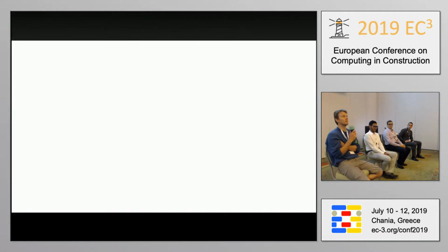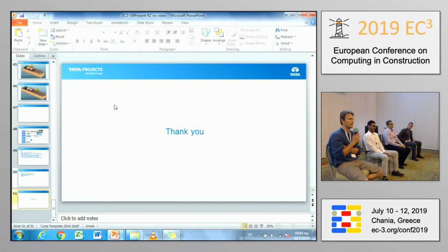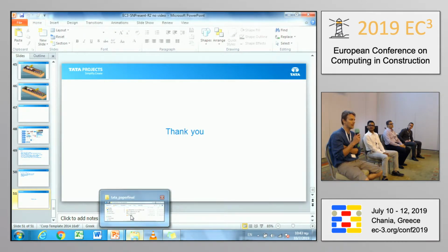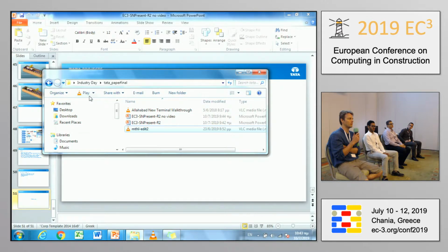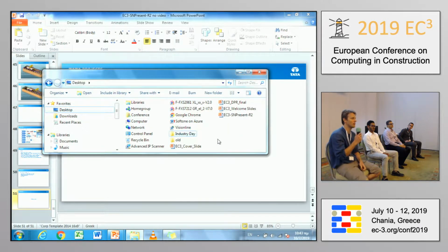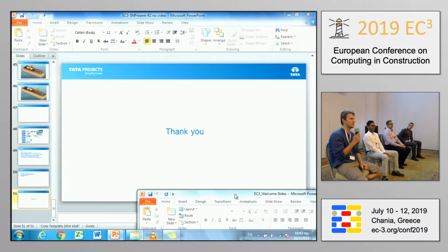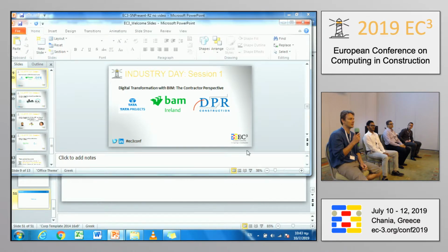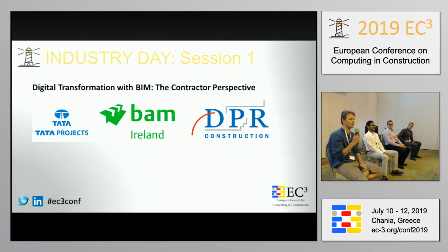Okay, so good practices have been that here at DPR we haven't done it so far yet, but what I've done before is really involve the subcontractors in training on using the tools and processes that are to be implemented on the project. This goes as far as training them directly on a specific tool, for example, exchanging BIM models. Really involve them in the training and try to have that mindset that we are together in a team, and not like you are the contractor, you have a contract and let's stick to that. So trainings have been a specific item that we have gone for.